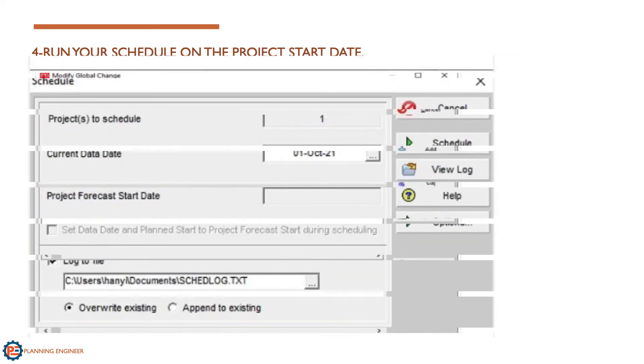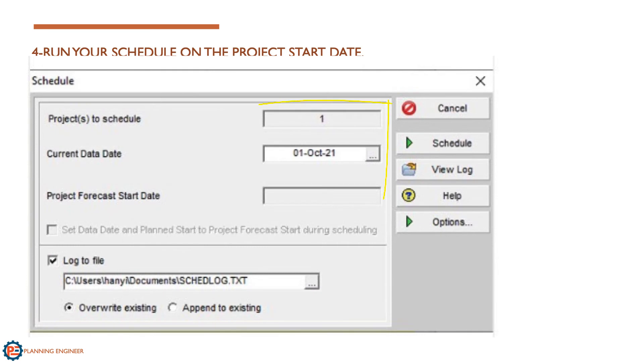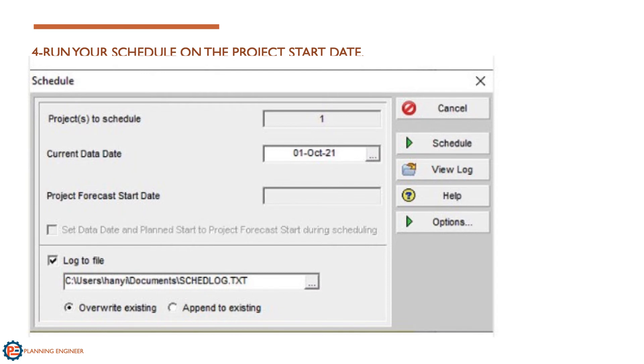Finally, you need to run your schedule using the baseline date. Now you have removed all the actuals from your schedule. You can use this version as a fresh baseline where you can do some modifications and use it again as a revised or recovery schedule.